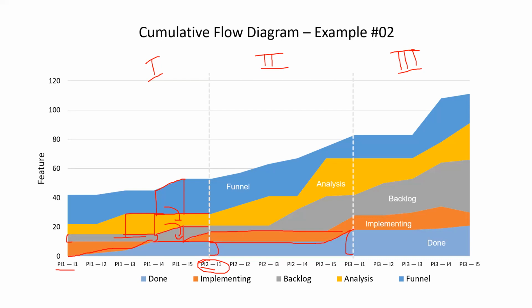That is nothing but doing waterfall in the name of agile. Simple. No assessments, no metrics, or nothing is required. Just by looking at that one single cumulative flow diagram, how your done line is moving, we can give a statement on how your teams are making progress.